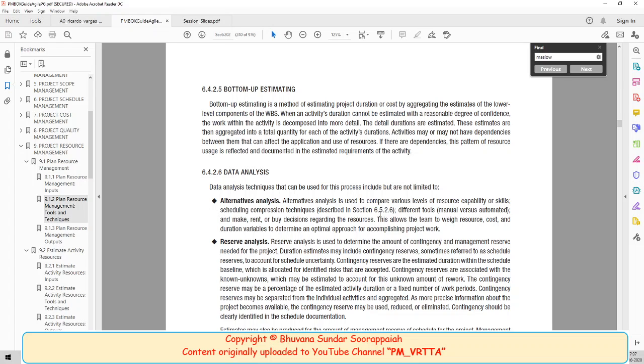And always remember, your estimation is a measure of your risk. That is why I said in a separate session I will talk about risk management together with estimation. One question will be: you ask your supplier how long it will take to do this. They say 10 days. Another supplier says 10 plus or minus 3 days. Another supplier says optimistically 3 days, pessimistically 10 days, most likely 5 days. Which one of them is most reliable? Of course the third option. So such interpretation is very important when you are using these estimations.